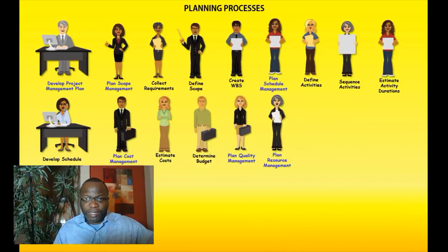Our next process here is taking us into the resource management knowledge area. In resource management, this is where we seek to understand how are we going to acquire the resources and how are we going to manage them throughout the life of the project. So in this first process, plan resource management, this is where you're coming up with a plan for how to acquire the resources you need. This is where you are coming out with a plan, a game plan for how to develop your people, for how to effectively lead your people, and also for how to effectively manage any resources on the project. Human, equipment, materials, supplies, they all fall under resource management.